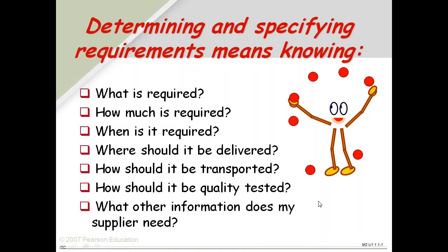Okay. So what we are looking at in determining the specs is: determining the specification means what is required, what do we need, how much is required, when is it required, and the next question could also come up, where should it be delivered? Should it be delivered at your premises, or at some warehouse? We try to know where it should be delivered, how it should be transported, whether it is going to be sent by truck, air, or sea, what the mode of transportation is,